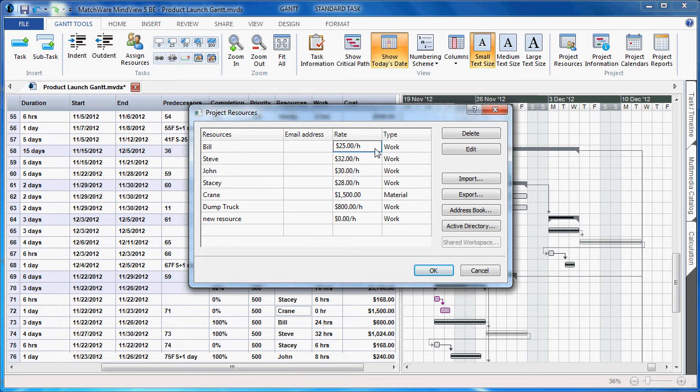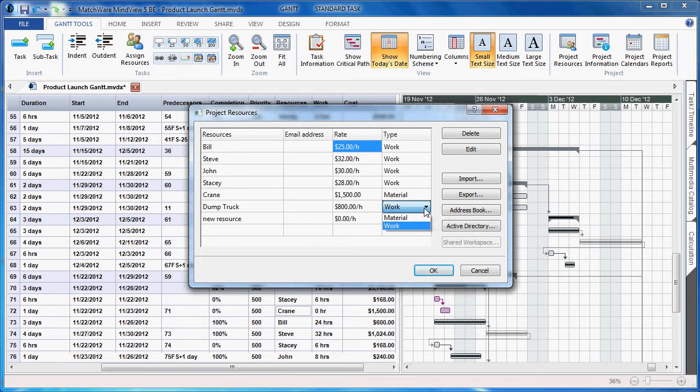The type of resource, as you can see, can be work or material depending on your particular project. In this case, the dump truck is a material resource.